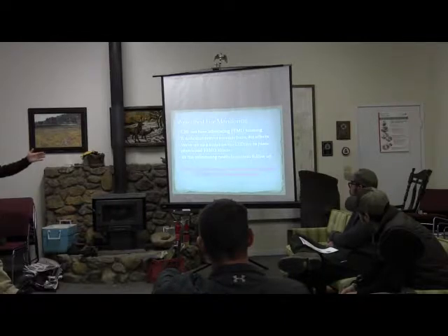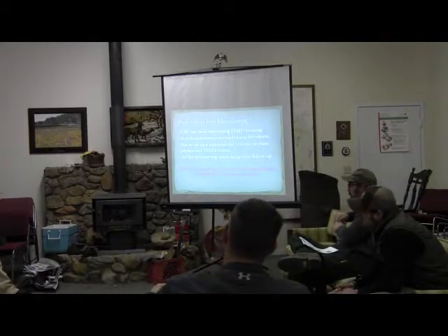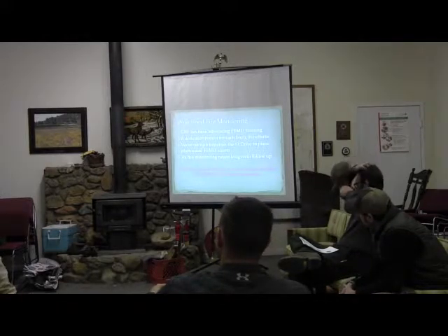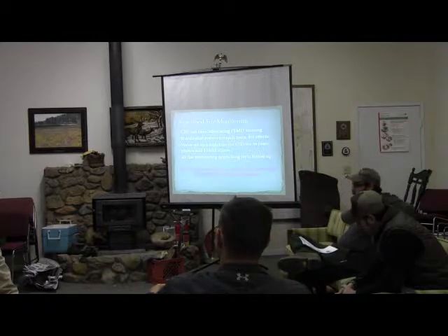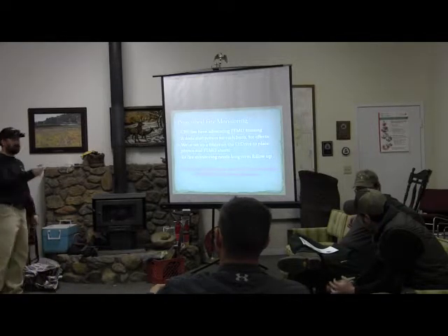We had a folder on the O drive. I need to update this, but I don't know where it's going to be now, so I don't have the new drive yet. And we actually have a folder that has the FEMO sheets, it has all the documentation that you need, like the blank sheets. I don't have any with me. I'll have to look to see if there's some there. But those FEMO sheets are the best because it just provides everything you need in a little booklet. You just grab a blank one every day and write in, and then scan it, dump it in the folder, and then we have it forever. And then prescribed fire monitoring does need long-term follow-up, which is more of a project management standpoint.